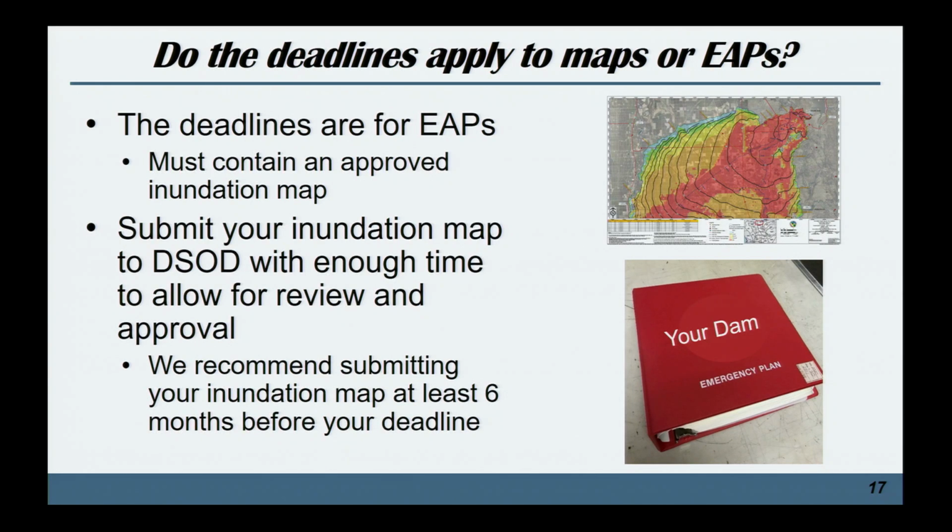So you would need to submit your inundation map ahead of time, then get it approved, and then have the EAP developed and submitted. So we recommend that you submit your inundation map with enough time to review, 6 months, but you know, that's kind of a rule of thumb, and it varies a lot right now because of how many submittals we've been getting. So feel free to email us at that MapRegs email or give us a call at our general number, and we can give you more information.